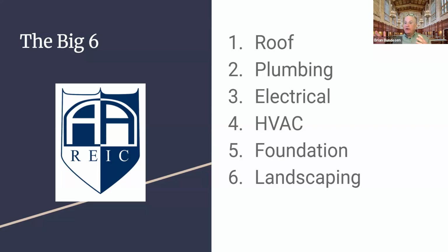We talked to multiple different contractors, and they said, "Yeah, I'll come out. I'll give you an estimate, but it's going to cost you $400. And if you hire me, I'll credit you the 400 back." That's what happens, and you can expect that until you build a relationship with this HVAC guy, or with a roofer, or with an electrician, or whatever. That's another element of it.